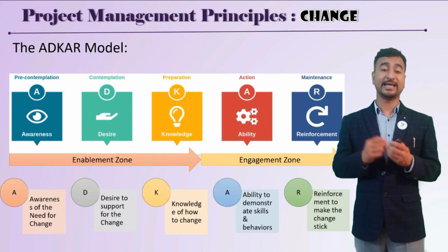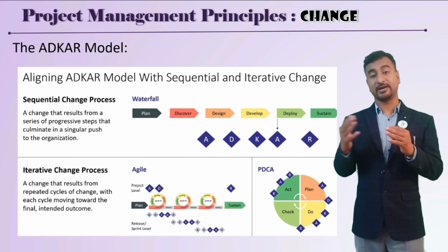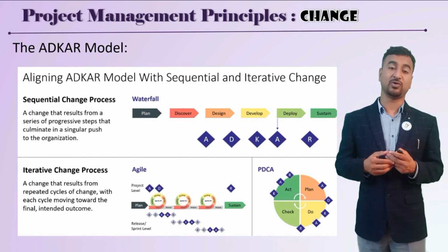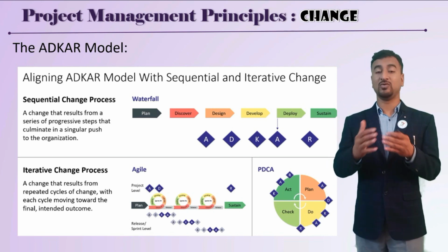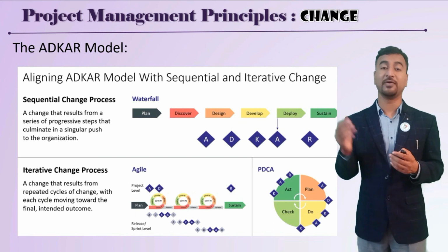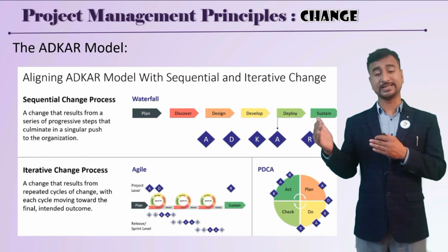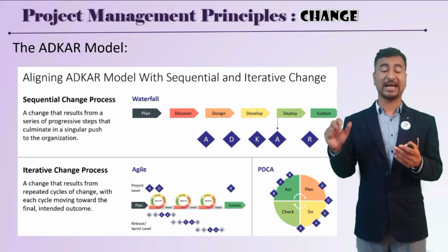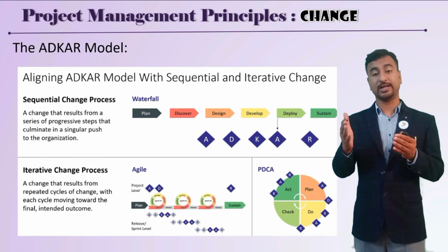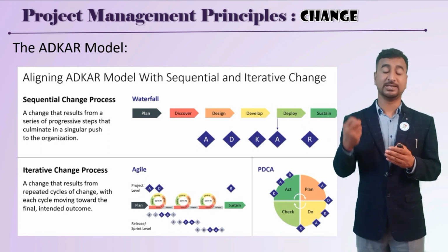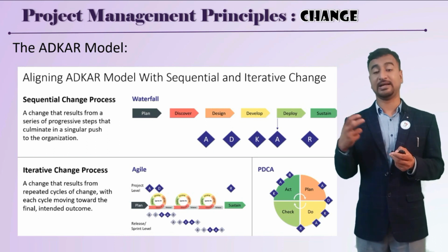So this is the ADKAR model that enables the change. There are different project management methodologies, as we discussed in the tailoring principles, where you need not blindly follow each and every process. If you are following the waterfall approach, where things are sequential, how can the ADKAR model apply? You can prepare the awareness, desire for change and knowledge in the planning stage only, and in execution you implement the ability, and finally release and reinforce.